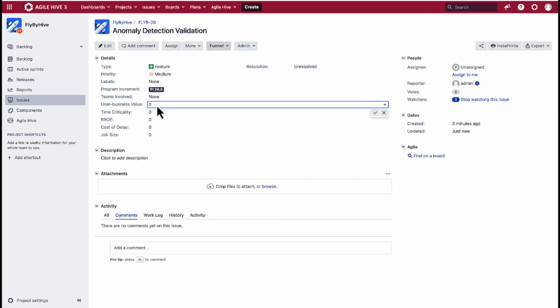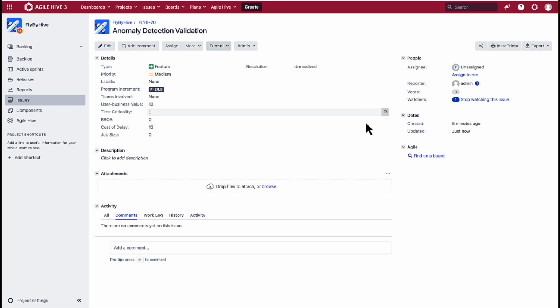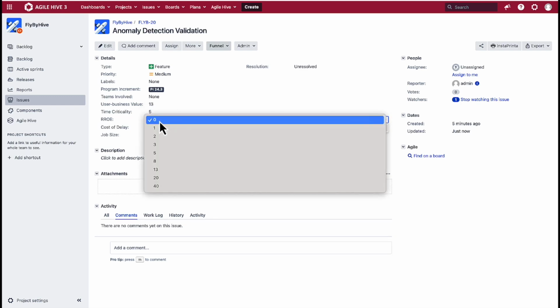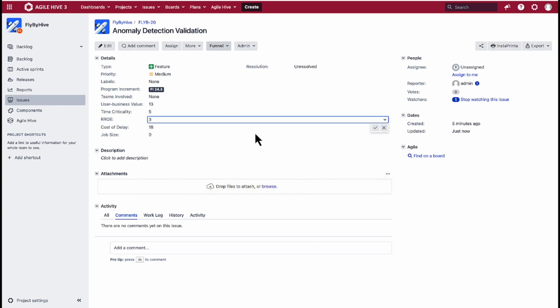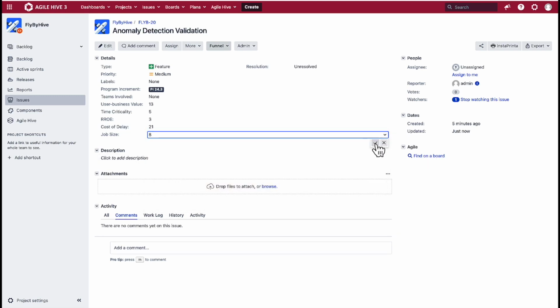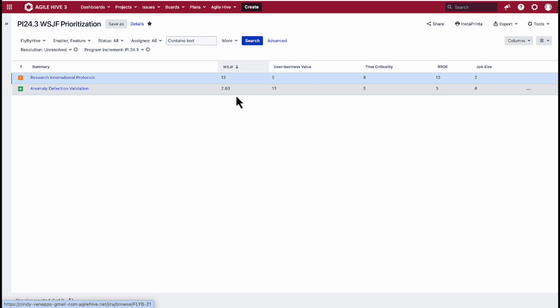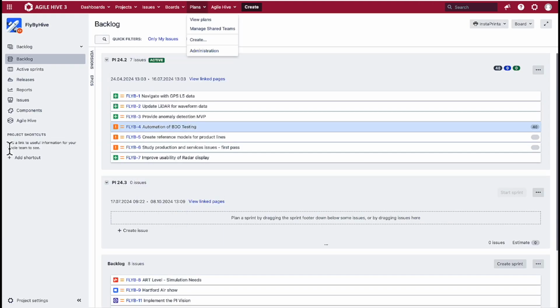Honestly, these gestures are not the time-consuming part of setting WSJF values. Instead, it is the conversation amongst stakeholders that's the real gold in using WSJF. I can put comments about the work on the WSJF conversation into the work item itself. And in a later vignette, I'll show you how to use the Confluence integration to capture the conversation comments in a more structured way. Now, on the ART report for this coming PI, I can see the work ordered by the WSJF value.